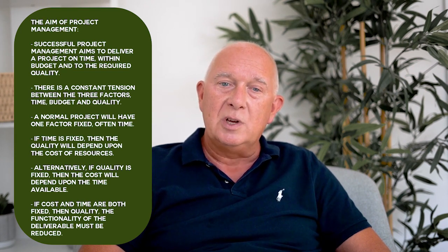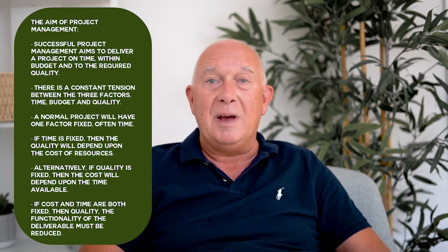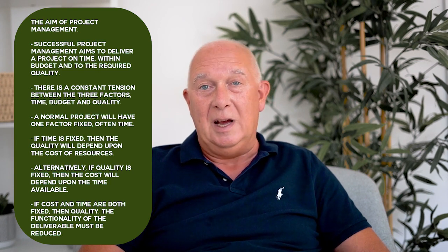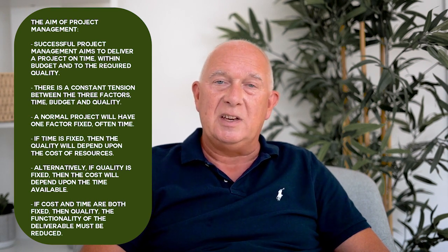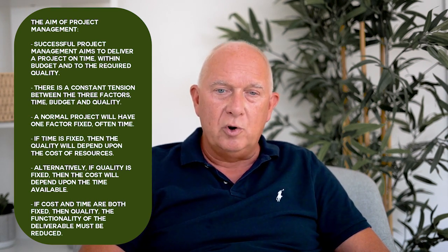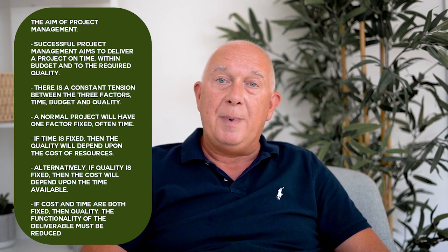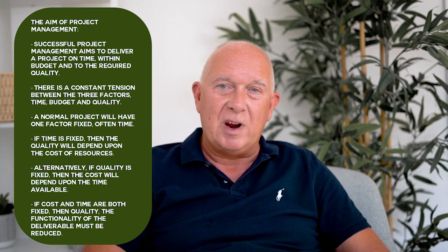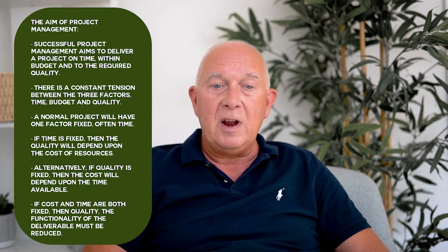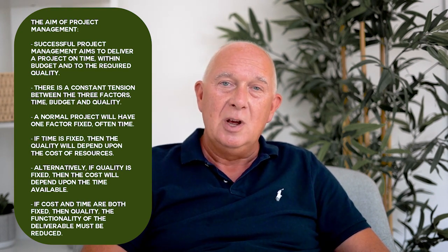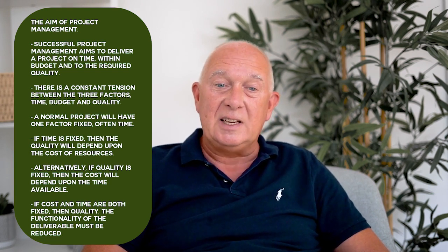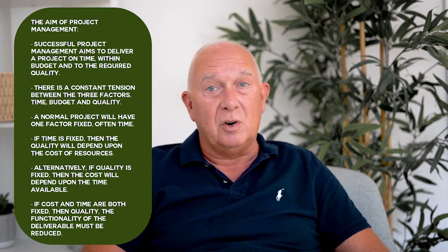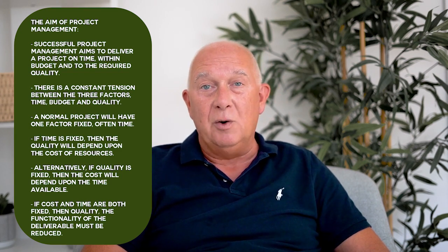If time is fixed, of course, then quality will depend upon the amount of money available in order to achieve the project. Alternatively, if we fix quality, and that is to say that all of the functionality must work 100%, then the cost will depend upon the time available. And so there's a trade-off between these three areas. And finally, if cost and time are both fixed, well, not only have you got a very difficult project on your hands, but quality, the functionality of the deliverable may have to be reduced in order to deliver to the budget or to the actual time.